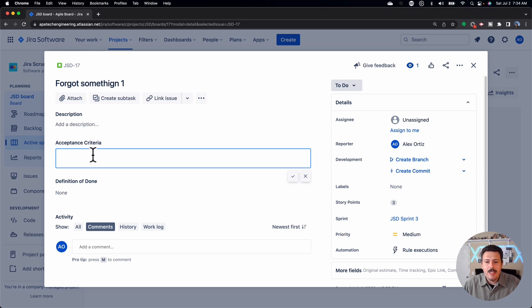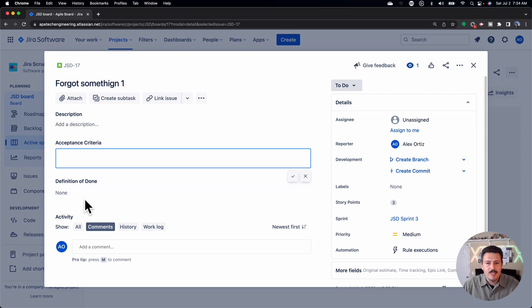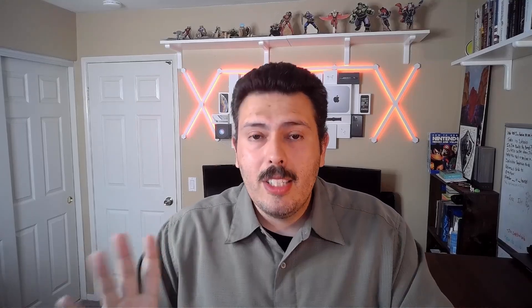My recommendation here is: do not wait until the end of the sprint, until that demo, to then give your blessing. At the end of every two weeks you have a sprint review where your developers and technical team will basically demonstrate everything they accomplished in that sprint. You can actually be very proactive as a product owner.